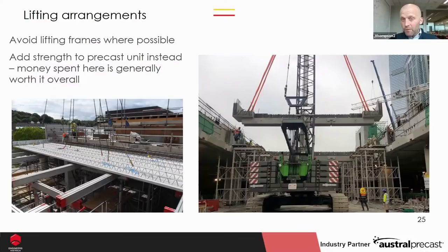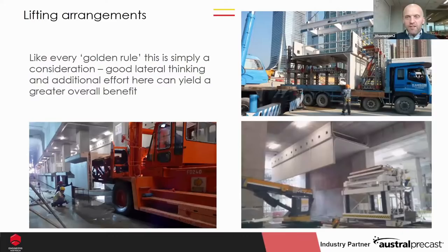That's a 120 ton capacity crane. That's a 60 ton beam, of what we could do on that floor. So you couldn't have even added 4 tons. But the solutions are for lattice plank, these nice equalizer chains, that they can be quite effective. Spend the money to get that benefit is my suggestion. Like every other rule that I set, I frequently break it.